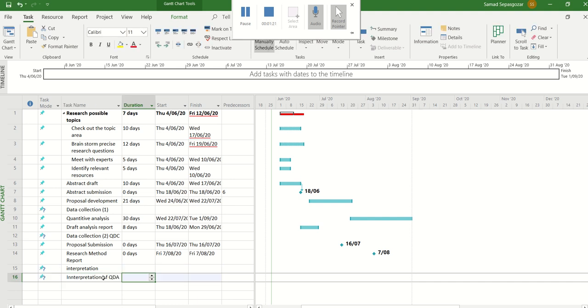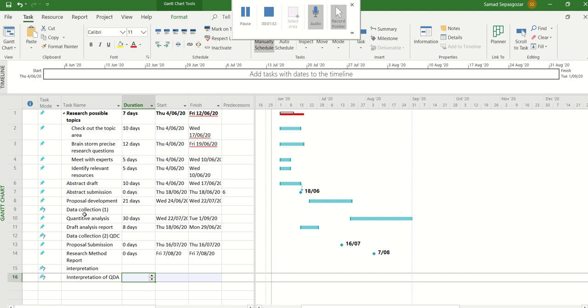If you have tasks that are related to each other, it might be a good idea if you group them together as subtasks. To do that, you need to just highlight the tasks that are related to each other and click the right indent button in the ribbon. So you can click on some of them, for example, you say data collection, data analysis.